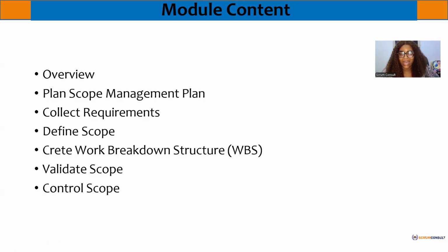You know that after collecting requirements, you don't work on that raw data. You need to sit down and sort those requirements before you create your work breakdown structure. So this will now give you a narrow list of what is within the project scope boundaries, okay? And that's what you create your work breakdown structure for, and you now get your baseline. So you need to understand this plan step by step so that no matter how the question comes in, you'll be able to know where the problem is from.